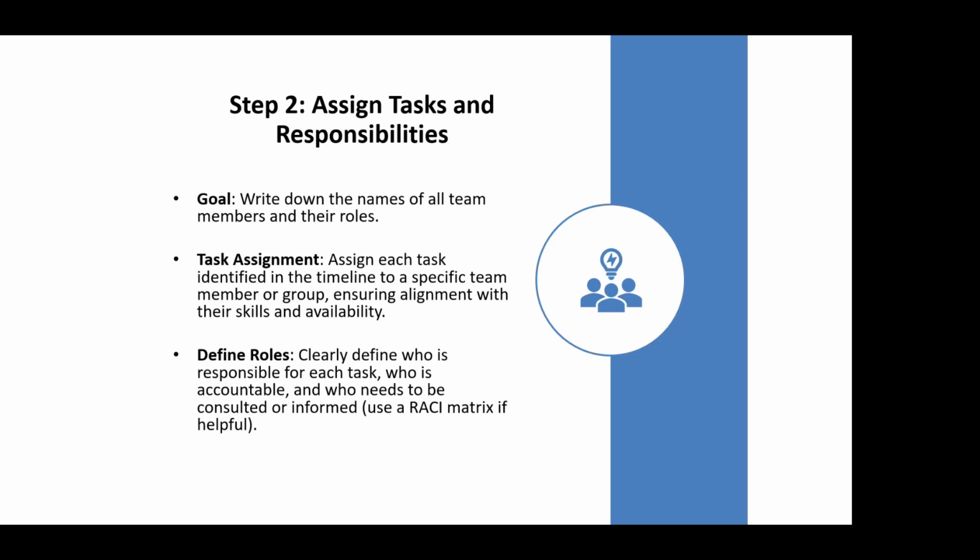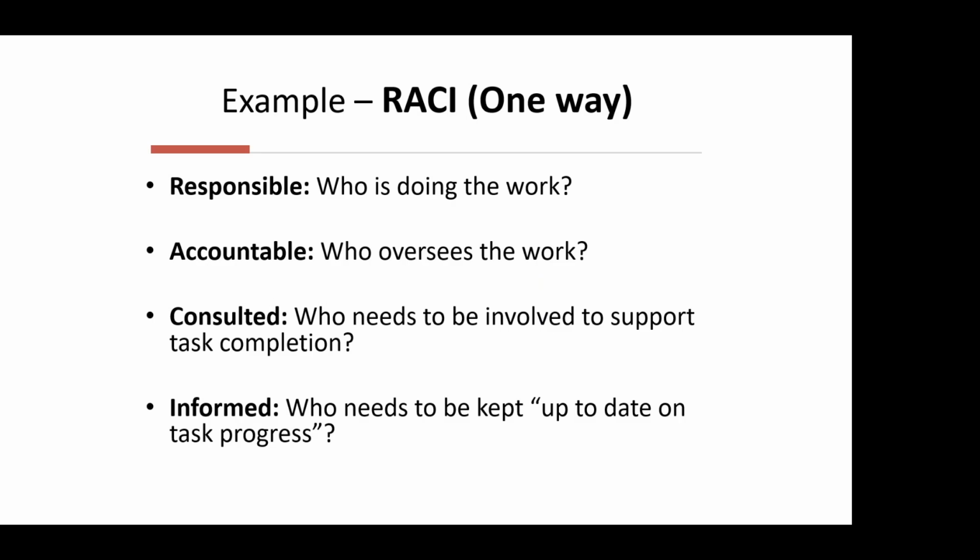And then here, you want to define their roles. You want to clearly define who's responsible for each task, who's accountable, and who needs to be consulted or informed. You'll see what I'm talking about there. I brought up some keywords and I'm going to highlight them here. A RACI matrix, or however you want to pronounce this acronym, is one way of accomplishing this, defining roles.